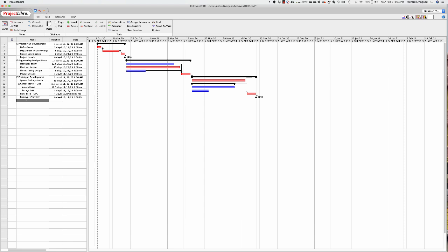First off, it impacts the budget, because if it took them twice as long to do it, then that means their piece is going to probably cost twice as much. Now, it's possible that it doesn't cost quite as much. Maybe during the first 5 days, 3 people were involved, but then because something didn't work out right, one person finishes the work on the storage unit. So it will drive the length of the task out, but it may not actually cost twice as much money. That gets into all kinds of budgeting issues.